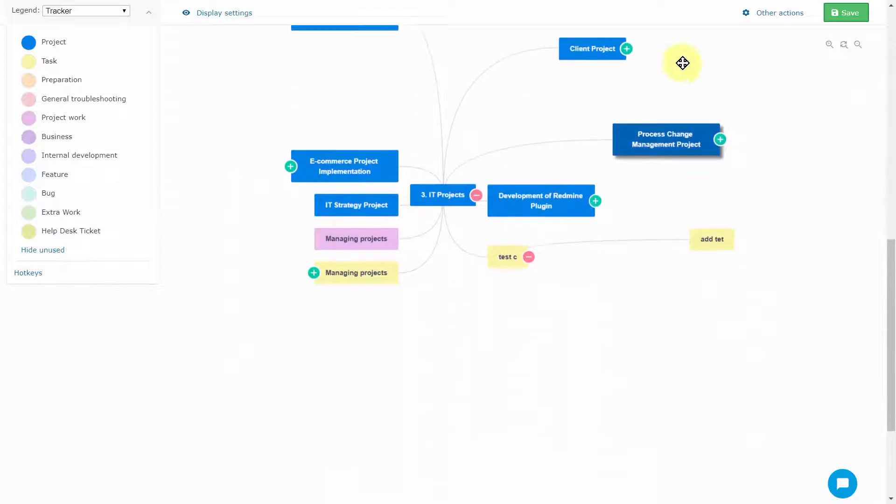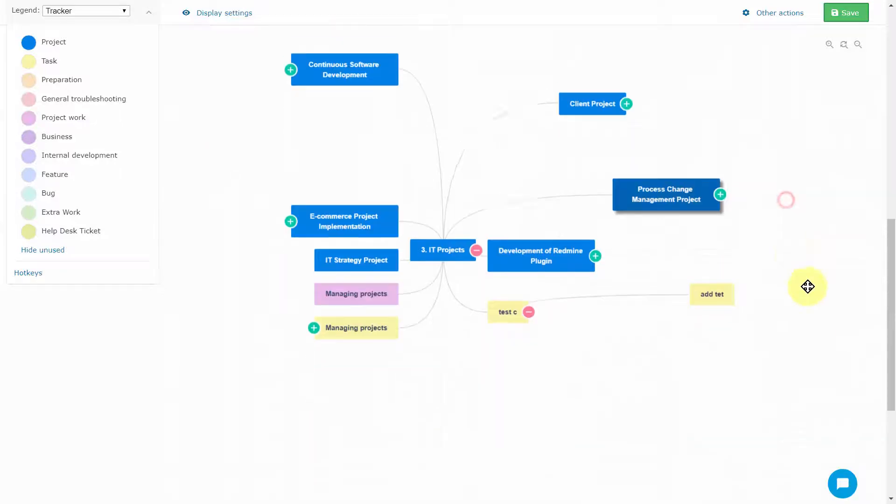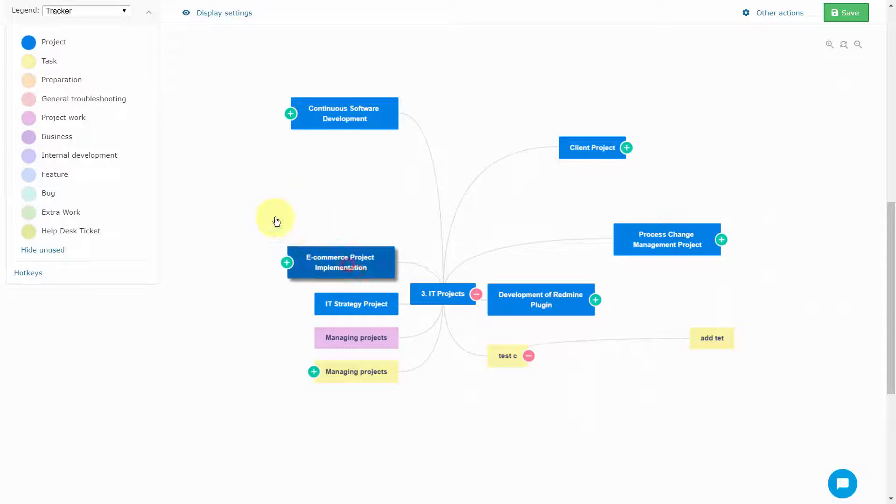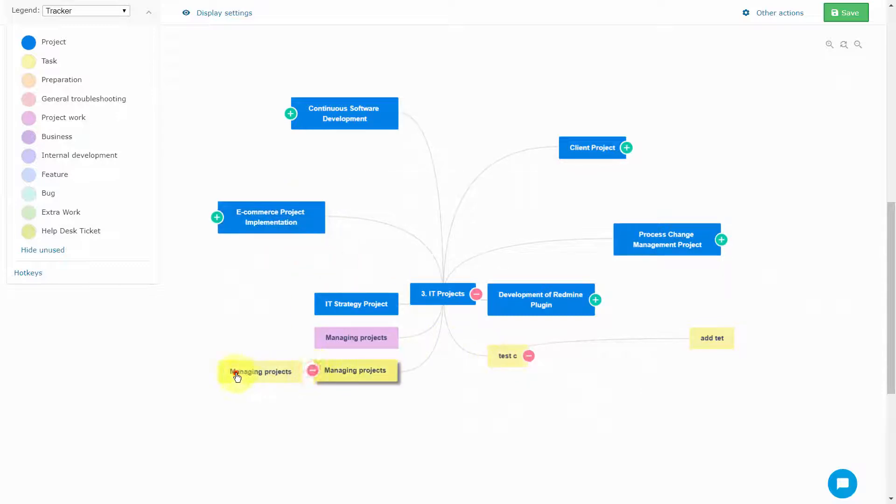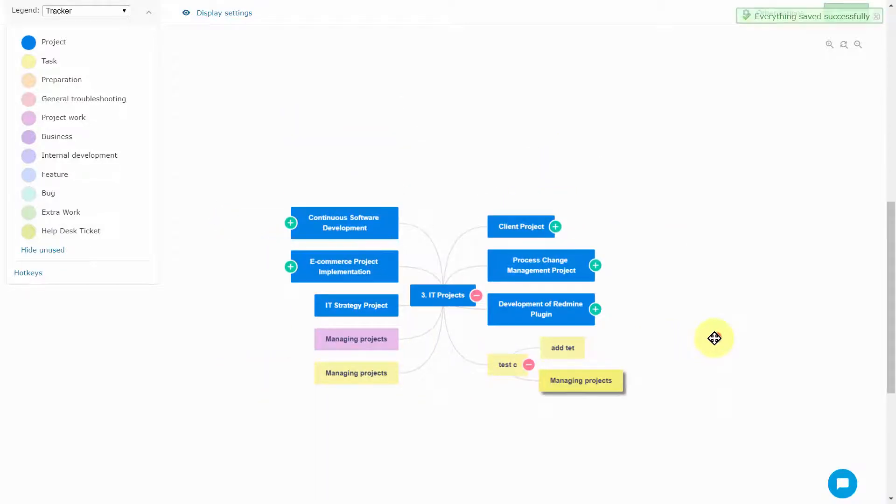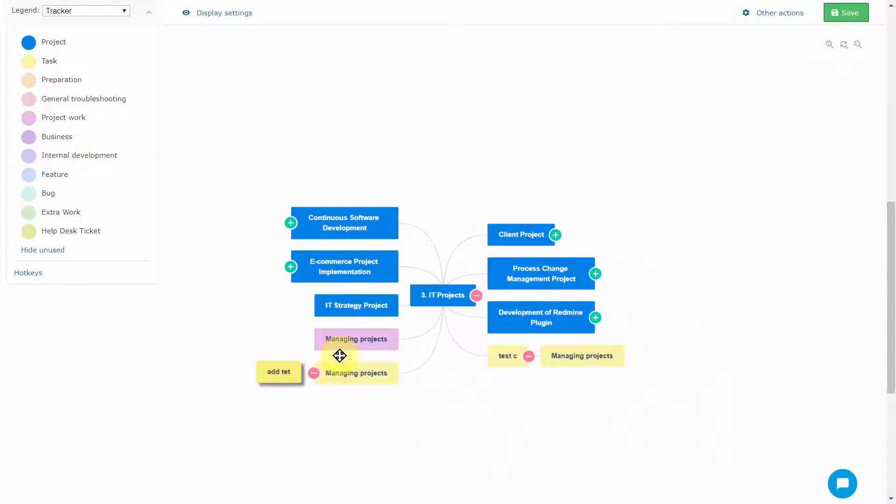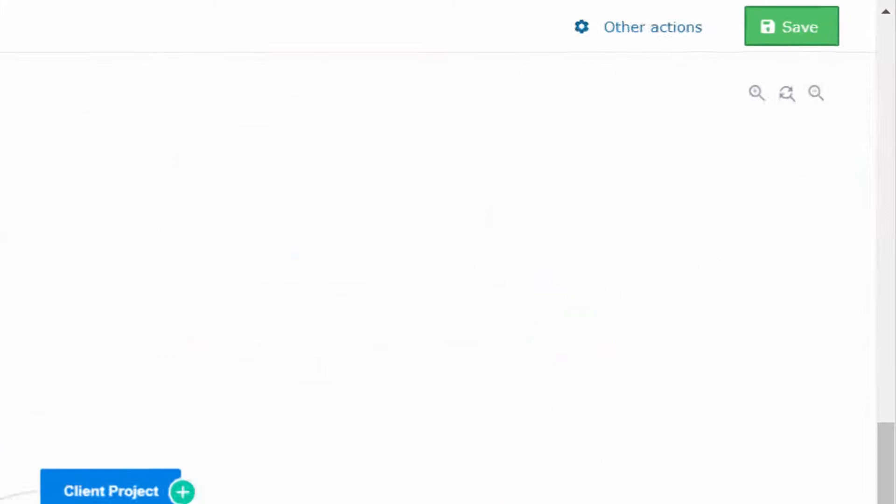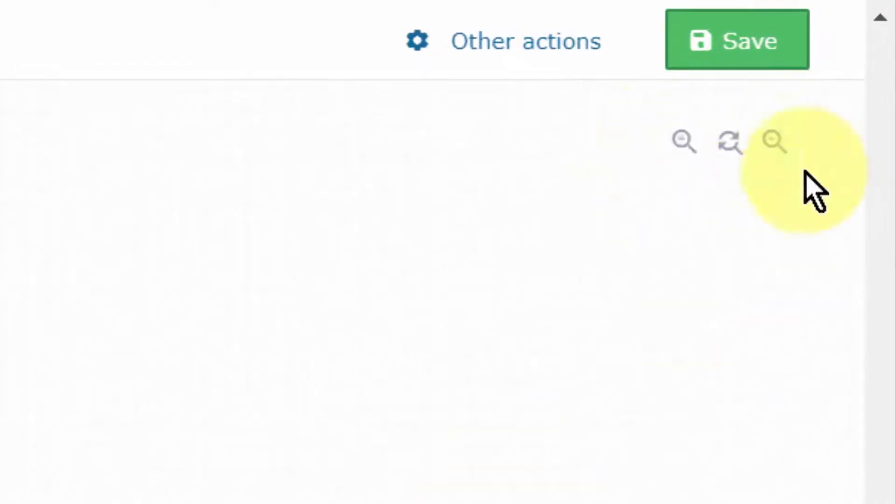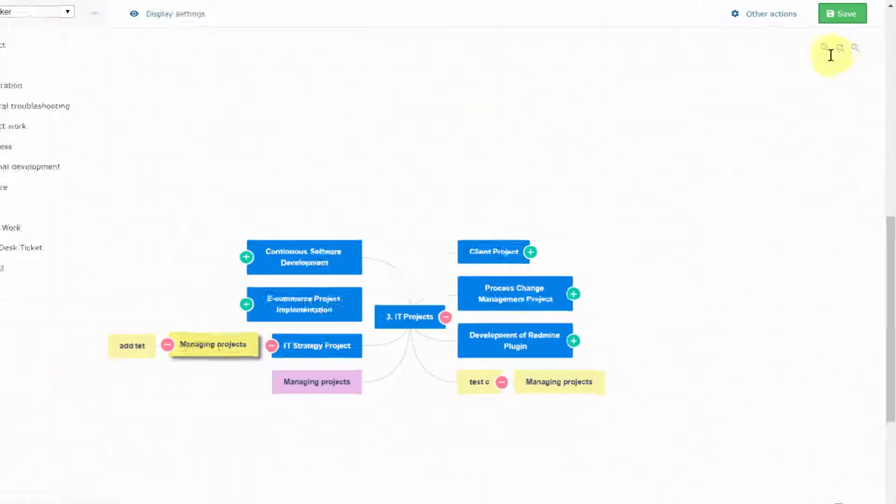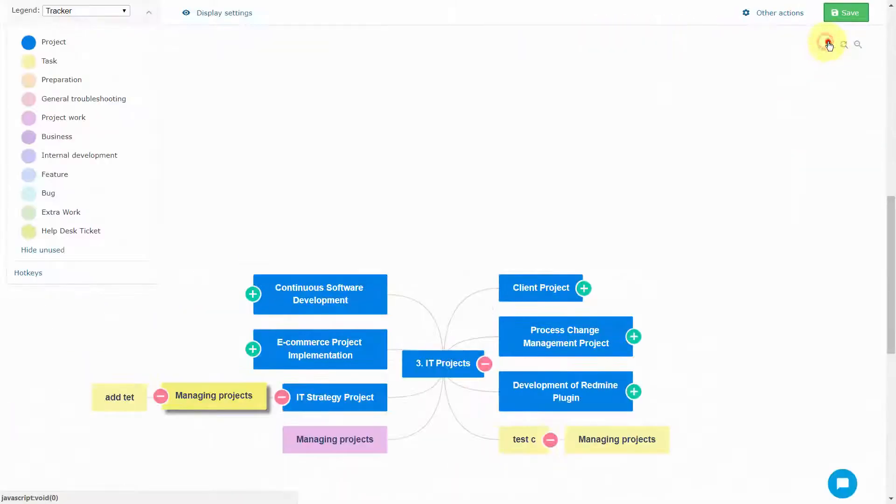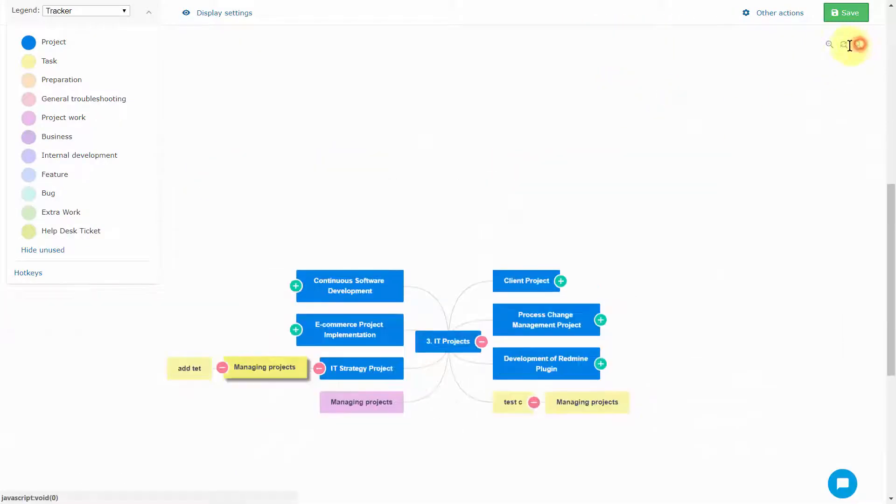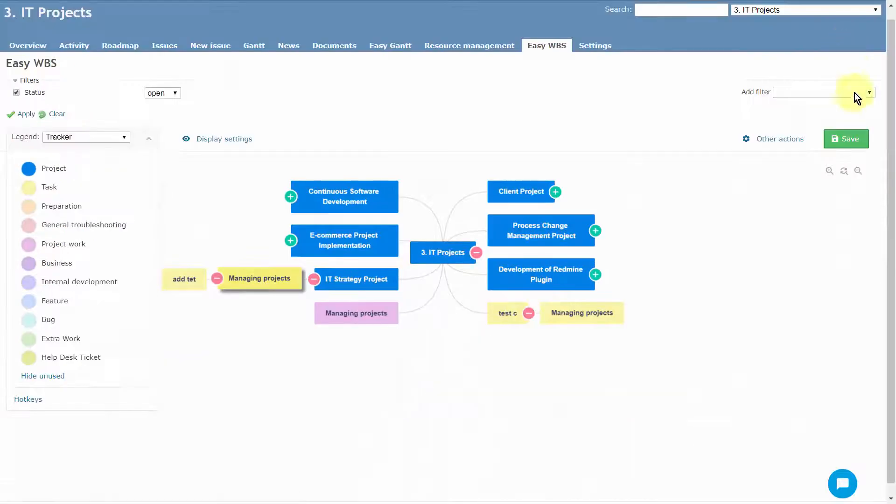Moreover, the background map can also be moved, and its position will be remembered after each saving. Using drag-and-drop functionality, you can easily move any task from one project to another, or move sub-tasks between different parent tasks. The MindMap can be zoomed in or out using the magnifier icons. The icon in the middle resets the zoom to the default level.